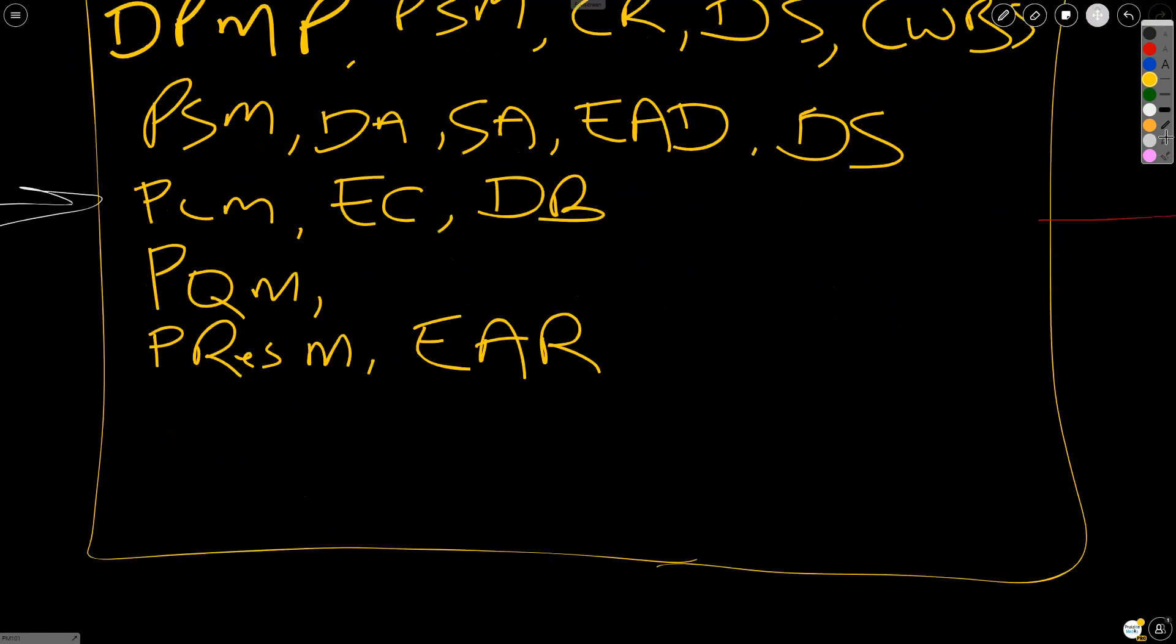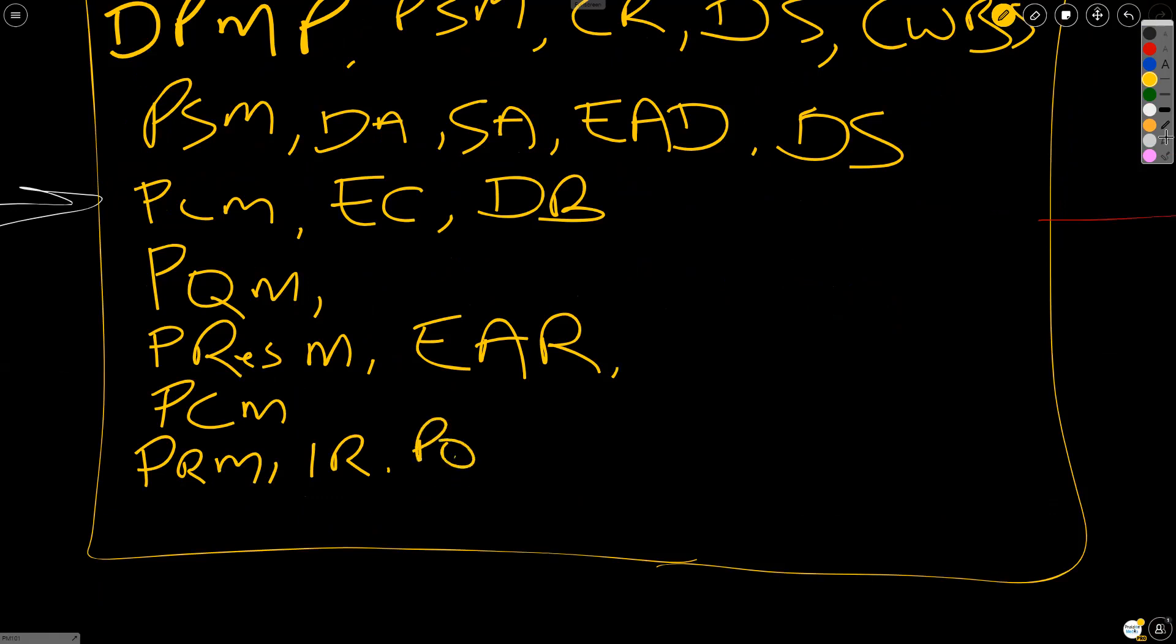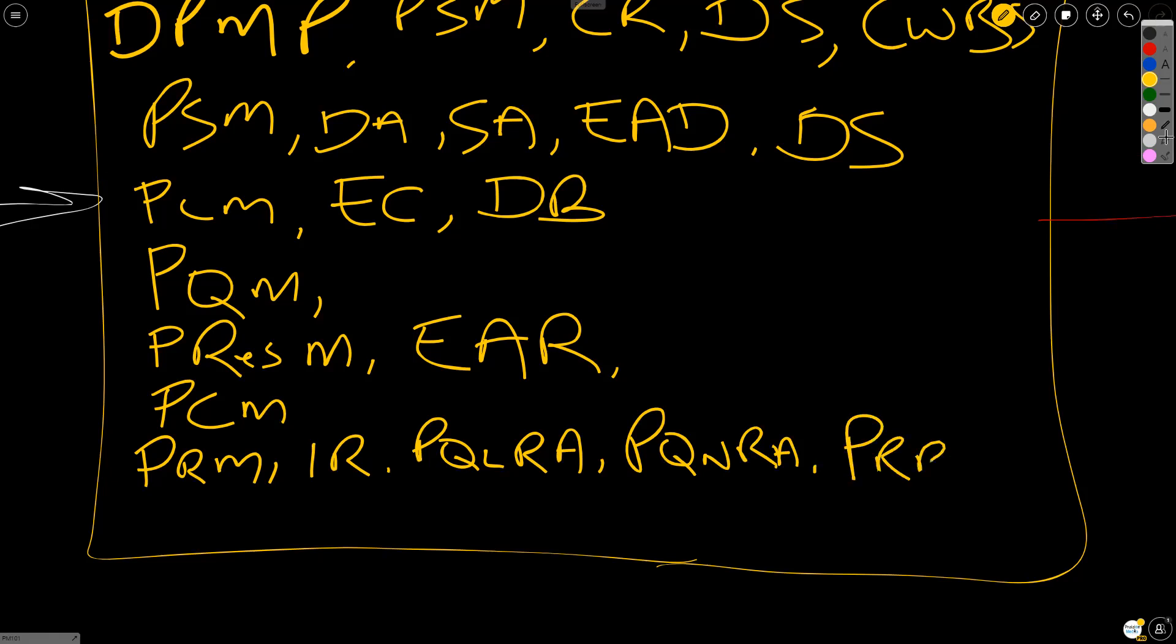Moving down the list, we have just a few left. In communications, we plan communications management. And in risk, we plan risk management. We identify risks. We perform a qualitative risk analysis. We perform a quantitative risk analysis. And then we plan risk responses. In procurement, we plan procurement management. And lastly, in stakeholder, we plan stakeholder engagement.